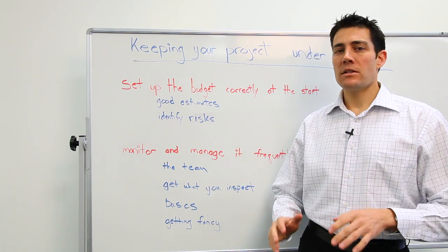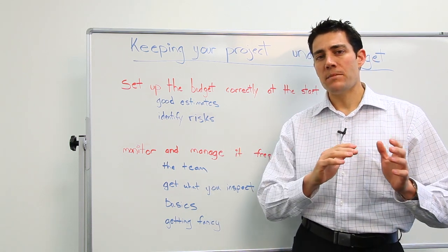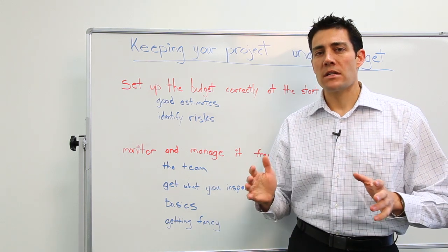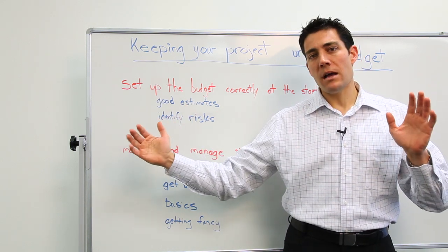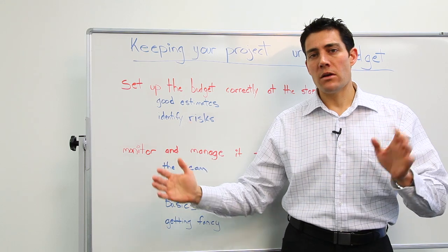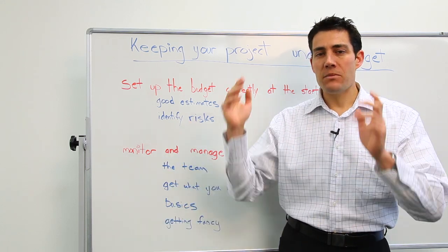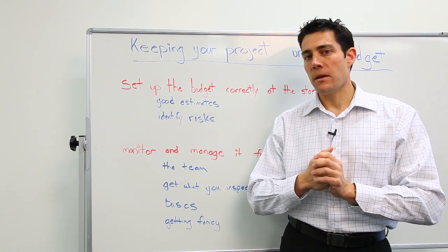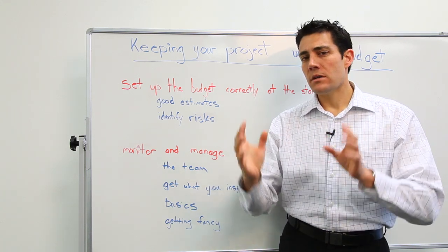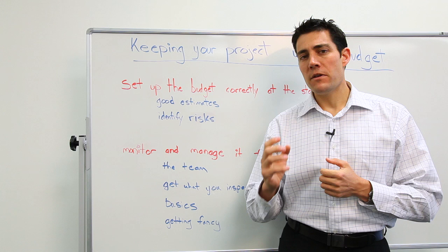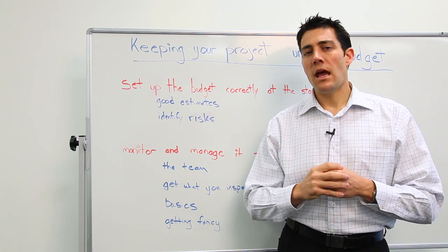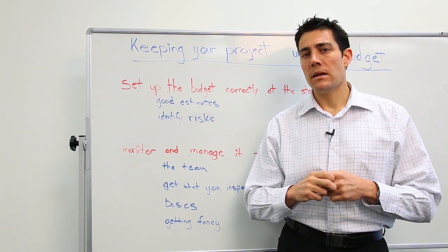The last estimate I do is I organize those tasks from both the top-down and the bottom-up estimate into a project schedule, assign resources, blow those tasks across time, and see how they're going to integrate with one another, and then, once again, add up the estimates that the project schedule has given me. I correlate the 3 different answers from each of those estimating techniques to give me a better feel of the variance between those and a better feel of what that budget's going to be.